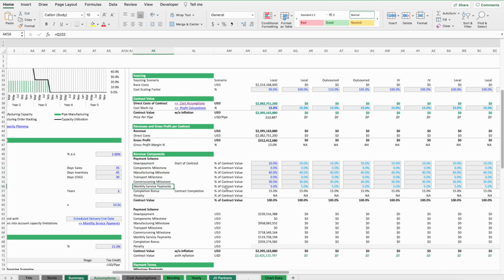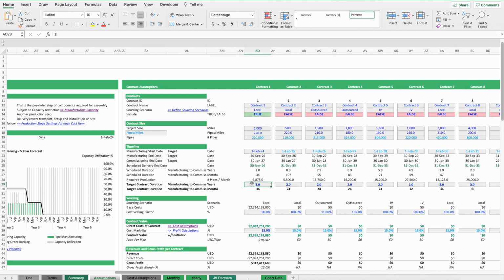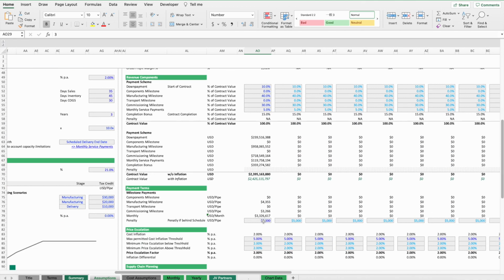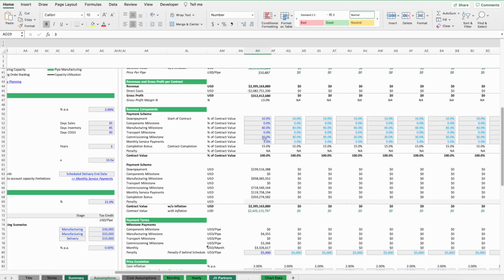Then, if you plan that this will take 3 months and you want to charge a certain amount on a monthly basis, you enter the portion here, and you can see the value of that from the total, divided by the number of months, which gives you the monthly invoice to be sent to the client.